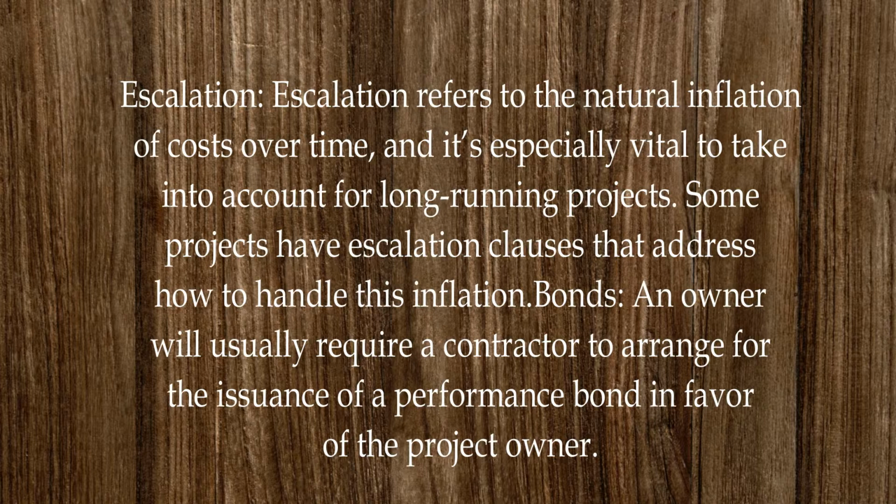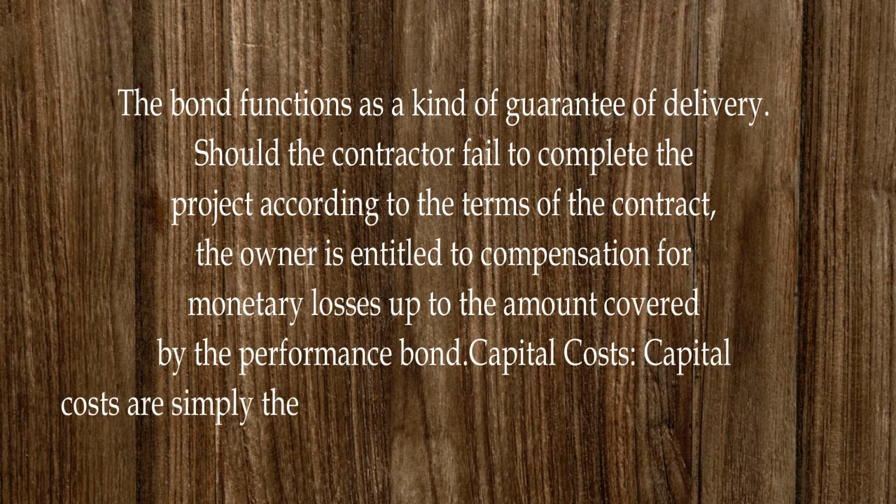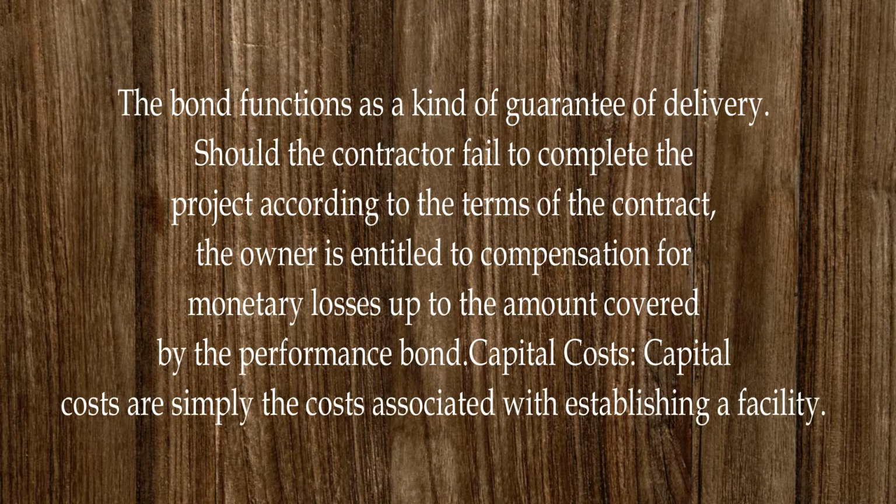Bonds. An owner will usually require a contractor to arrange for the issuance of a performance bond in favor of the project owner. The bond functions as a kind of guarantee of delivery. Should the contractor fail to complete the project according to the terms of the contract, the owner is entitled to compensation for monetary losses up to the amount covered by the performance bond.